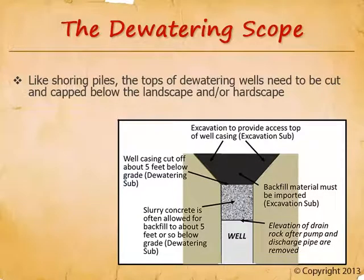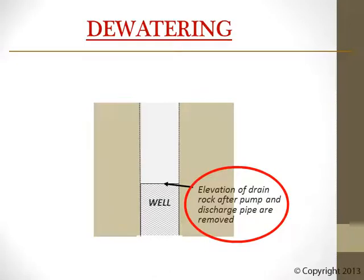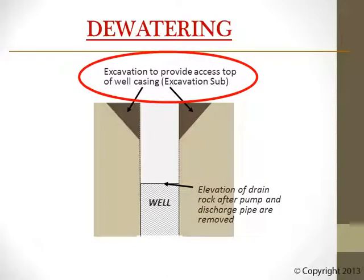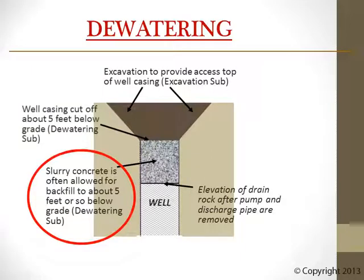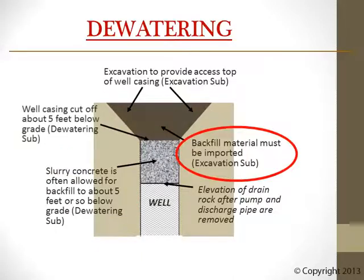Let's walk step by step through cutting, capping, and abandoning the dewatering wells. The dewatering subcontractor will remove their pump and discharge pipe, which causes the drain rock to settle down lower in the casing. Salvaging of materials may be the only piece of this operation included in sub-bids without specific direction. The excavation subcontractor should dig down to provide safe access to the point of cut on the casing. The dewatering subcontractor will cut off the well casing typically about 5 feet below grade, and they also need to be responsible for off-hauling the debris. Backfilling from the top of drain rock to the top of casing will be completed by the dewatering subcontractor — usually done with slurry concrete, but sometimes pea gravel or other self-compacting material. Finally, importing the soil, backfilling, and compacting is typically done by the excavation subcontractor.